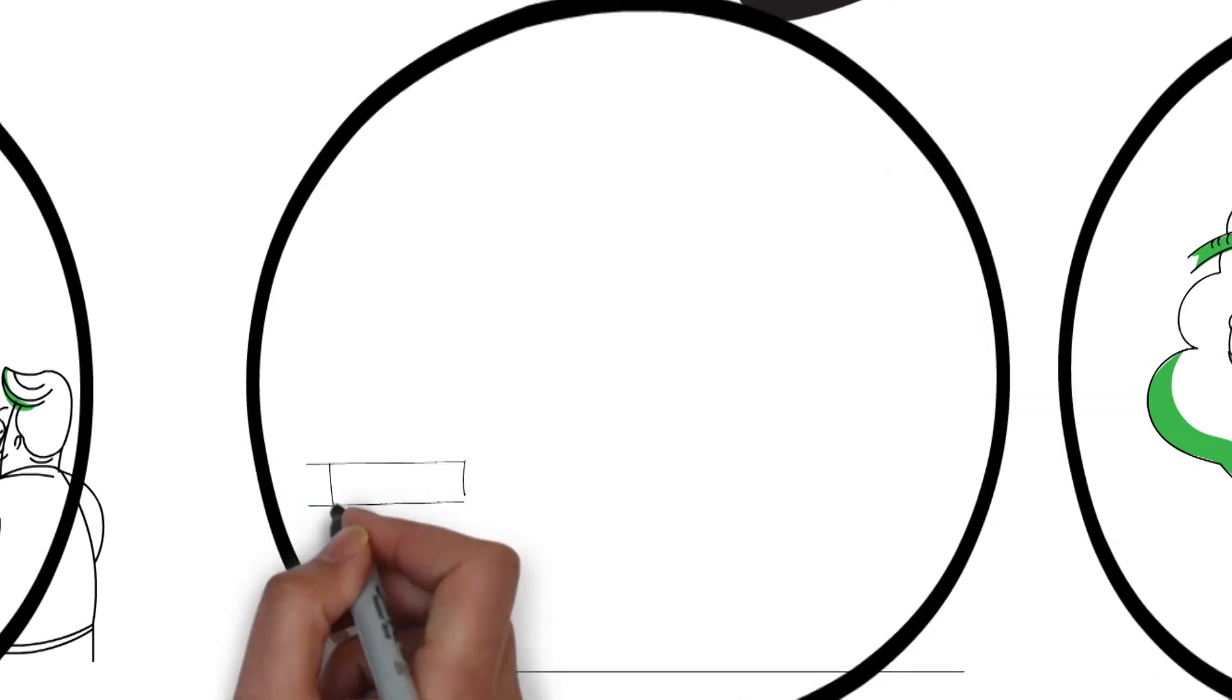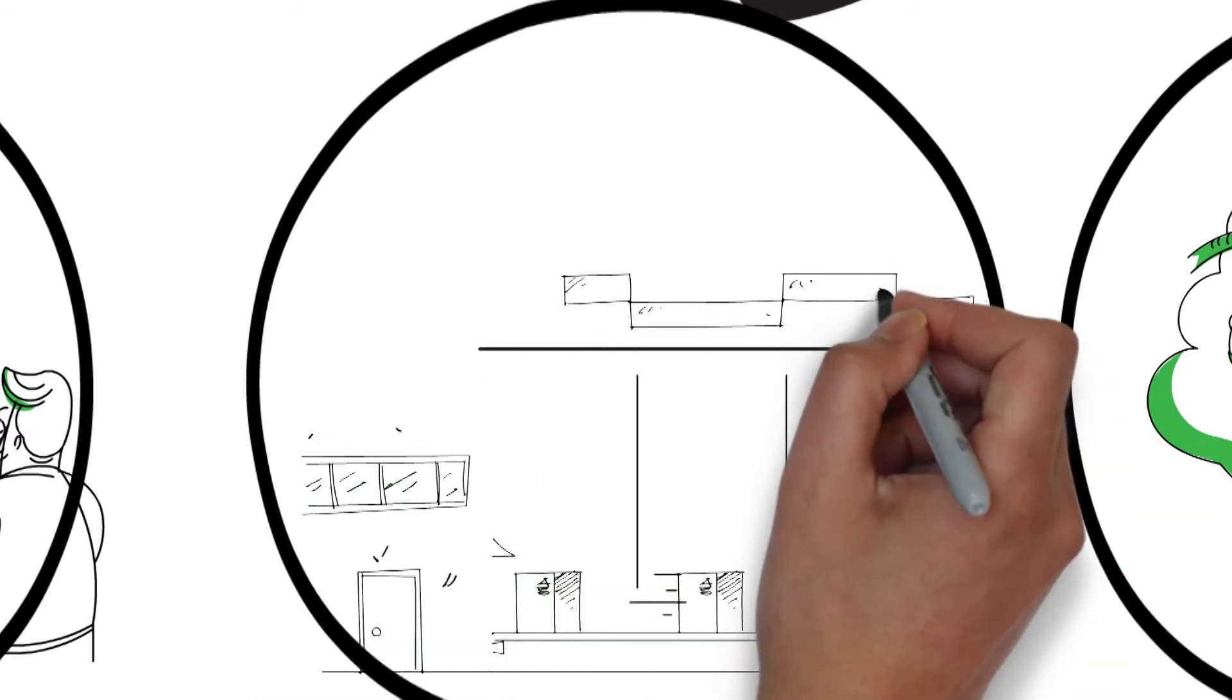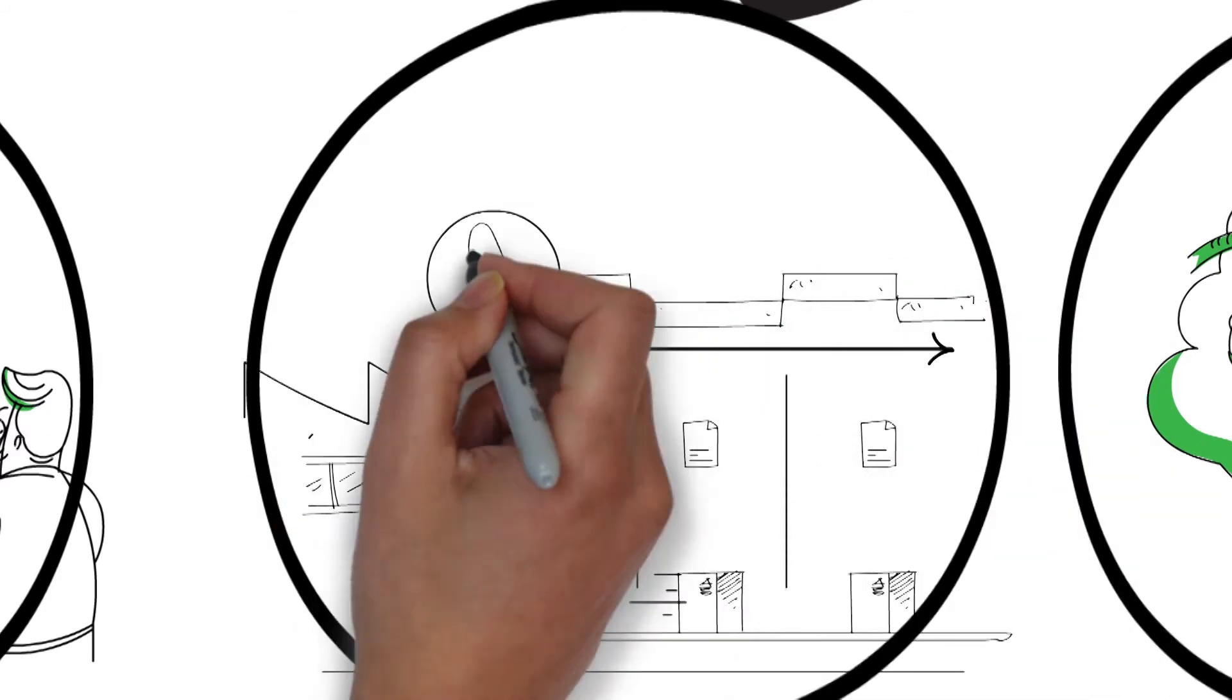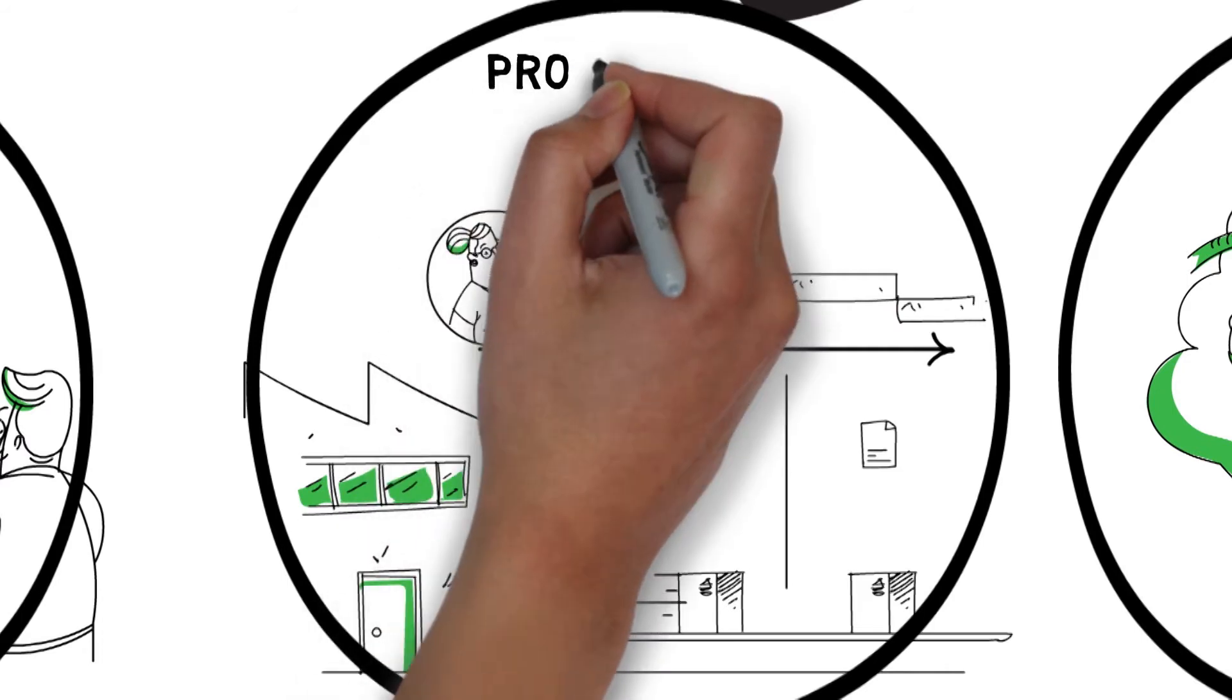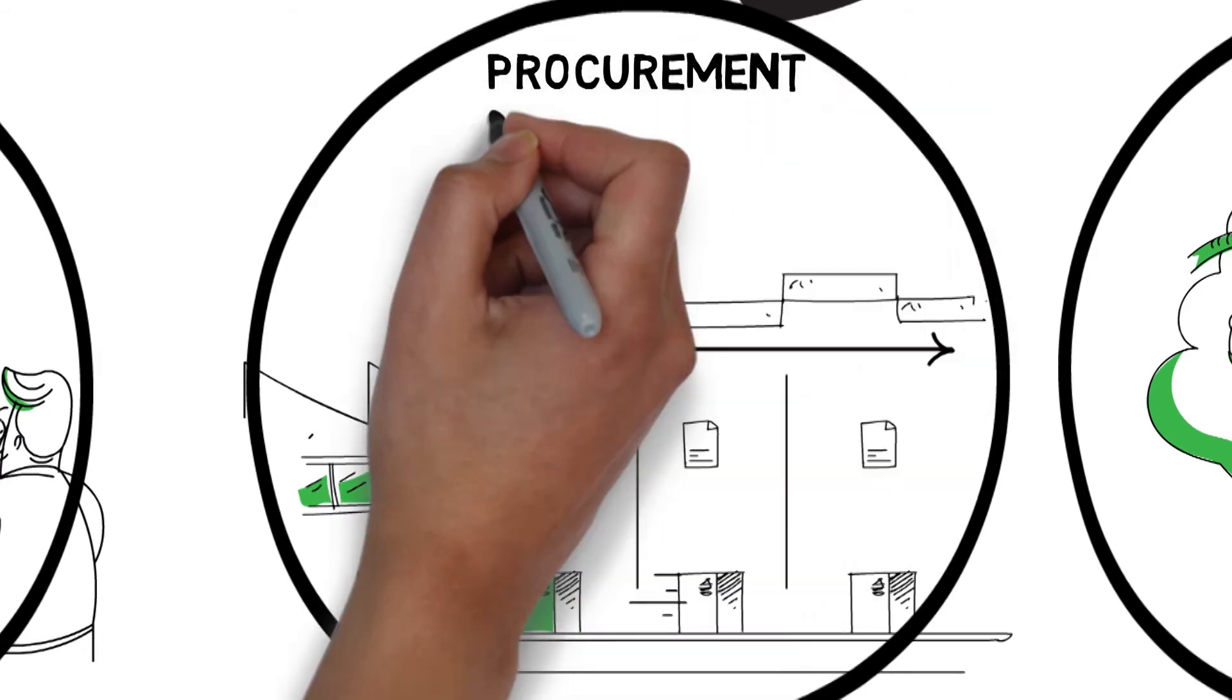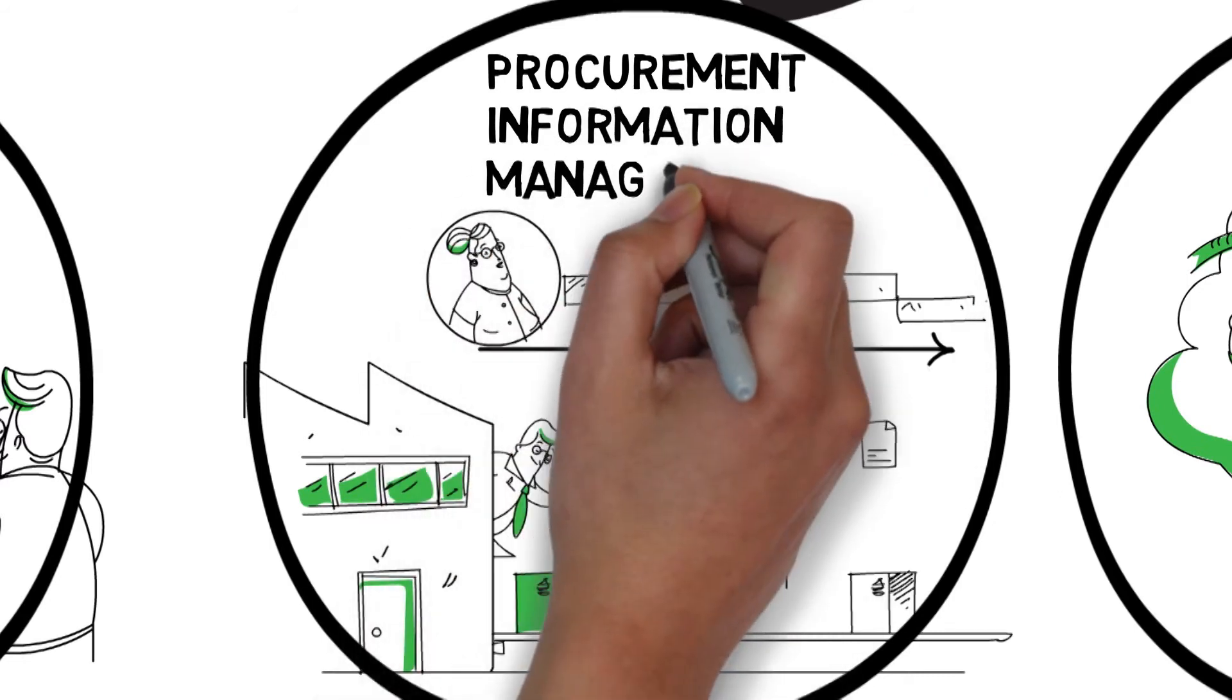The requirement for data consistency amongst material components and the delivery of electronic fabrication data is mapped out in the IM procedure. The information manager works with the procurement team to emphasize this requirement along with a sequence of procurement and fabrication that supports the optimal path of construction and the CWP release plan.